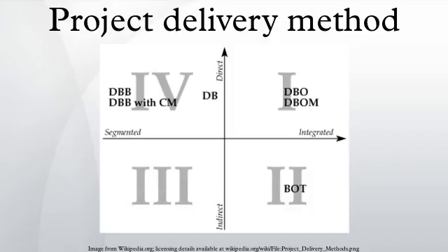Conceptual differences between delivery methods. There are two key variables which account for the bulk of the variation between delivery methods: the extent of the integration of the various service providers, and the extent to which the owner is directly financing the project.